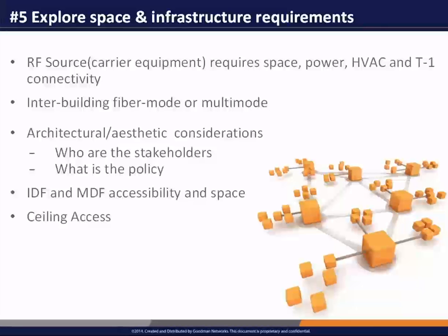Okay, so the fifth key is exploring the space and infrastructure requirements. This can be a real shocker for the facility, particularly as it relates to the space requirement and ultimately power, HVAC, and T1 connectivity. An indoor DAS deployment, think of it as a miniature cell site that they're putting inside one of your buildings.